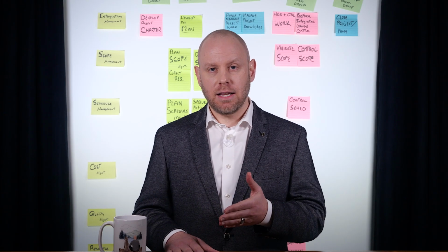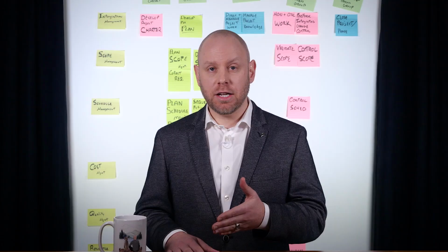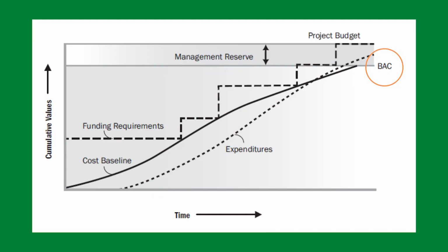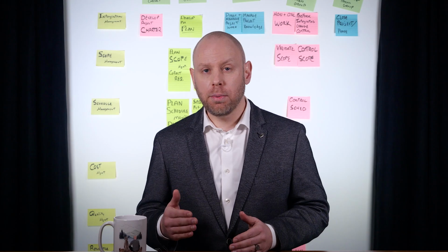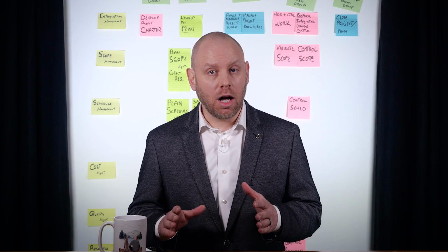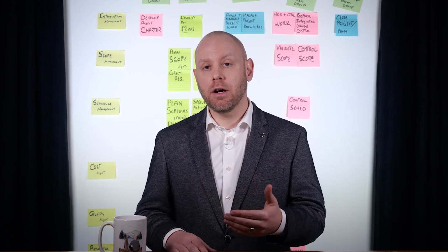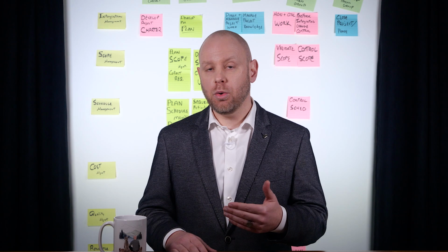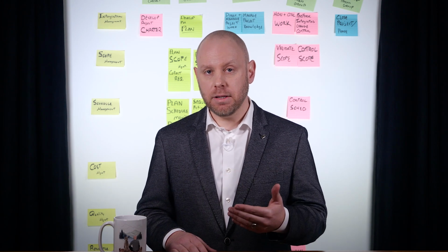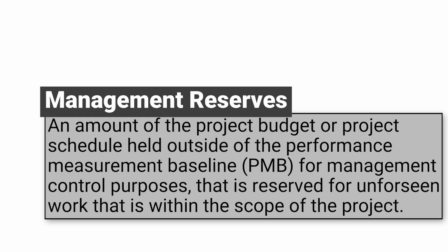This terminates at the end of the project with BAC. This baseline is a reference point or control point where scope, budget, actual cost, and schedule are compared to earned value for performance measurement. Management reserves is defined as the amount of project budget or schedule held outside of the performance management baseline.